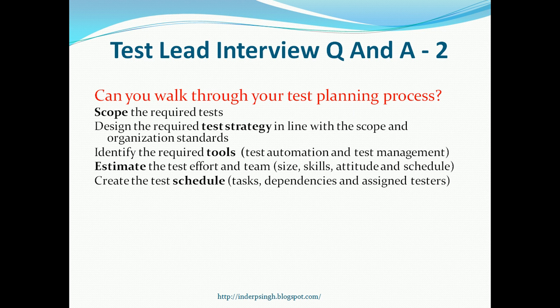Then based on the test strategy and the estimate, create the actual schedule. What are going to be the different tasks, starting from top level tasks, drilling down, and in what order those tasks will be performed, whether tasks have dependencies on one another, and which tasks are assigned to which testers in the team.